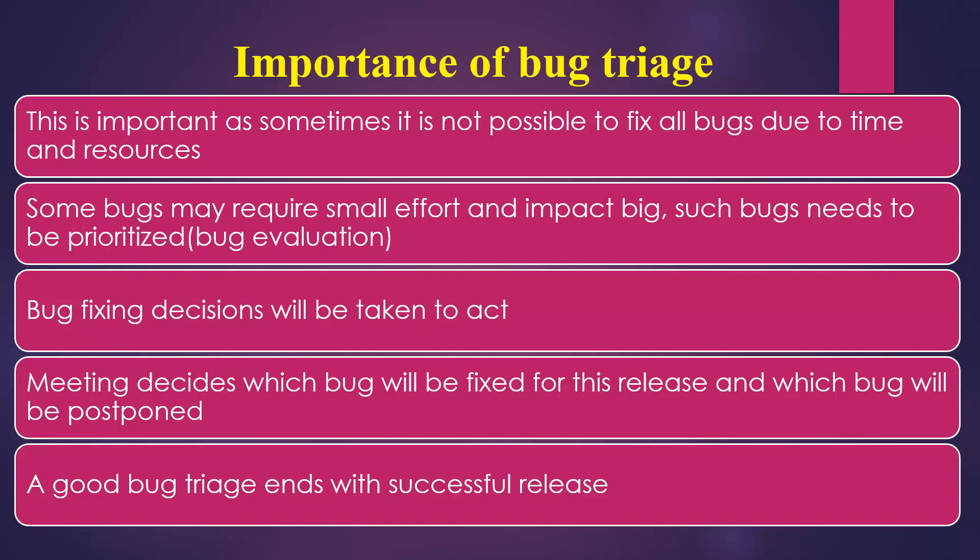Once a decision is taken, the action is also decided: who will fix the bug, how they will fix it, and when. The meeting decides which bugs will be fixed for the current release and which will be postponed. Some bugs — like small alignment or color issues — may not have a big impact. If there aren't enough resources to fix them for this release, they can be moved to the backlog and addressed in the next sprint or release. You can also mention them in the release notes.